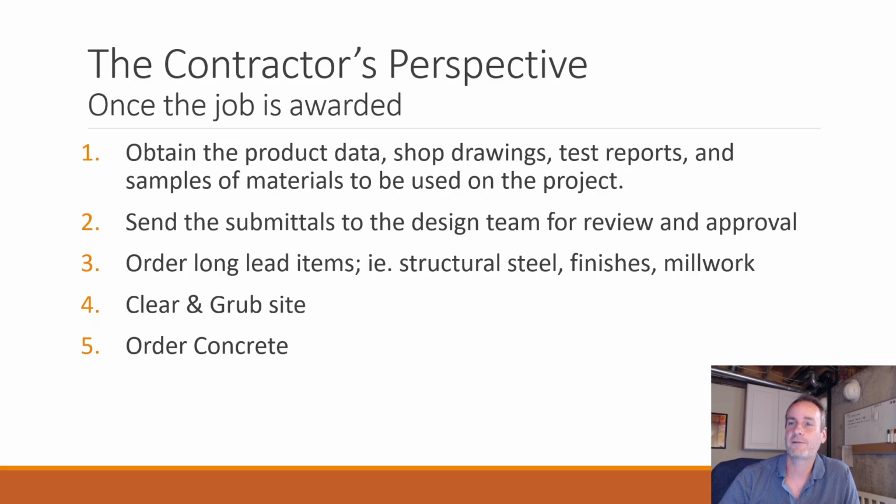They have to accumulate all of this so they make sure they're doing it the way it needs to be done. They have to get all their submittals to the design team, assuming the design team is still used in the process, like we said earlier, to get approval as work is going along, or preferably before work goes, because you don't want to have to redo something, right?